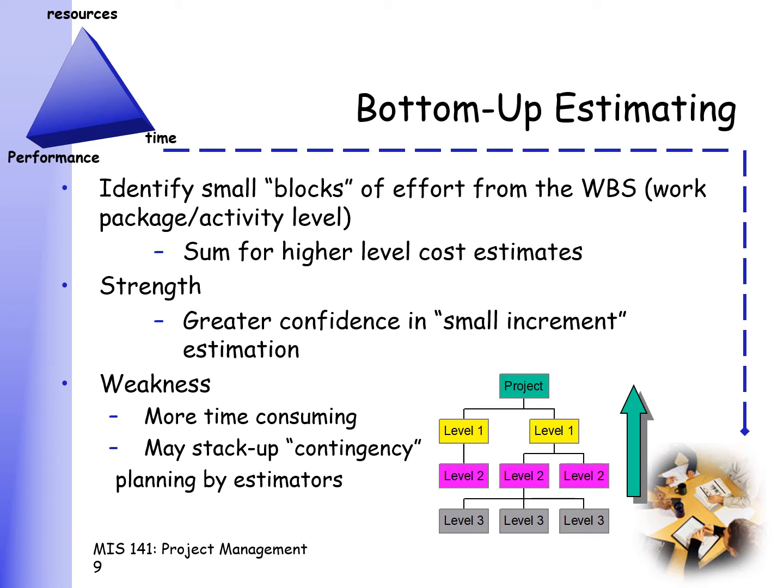Now, the strength here really is you have greater confidence in small increment estimation because you are really looking at each and every activity and you're going to the lowest level of detail. Unfortunately, the main weakness here is that it is time consuming. Imagine going through 300 of those activities and asking each and every responsible individual how long it will take.